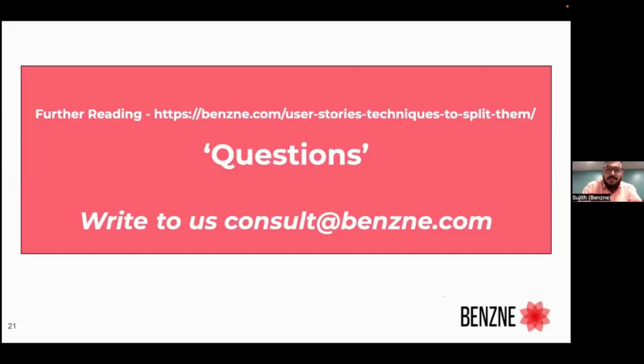So I'll be very quick here. Just one question that I want to ask is, you have very well explained how we should slice the story. I would like to know when we should do the task and subtask breakdown with the story. Right. So Manjeet, breaking a user story into subtask level happens in the planning meeting on day one of the sprint.